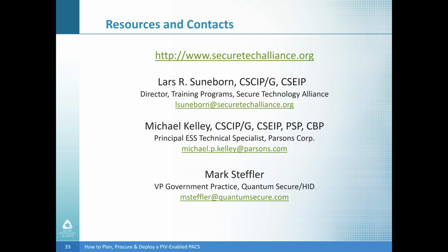Do you have to do an entire system? How many infrastructure changes do you make? So without having that current state, desired end state, and the gap analysis done, you really won't know for sure how to estimate or budget for it. So I would start with those if you haven't been given a budget target, and then look at the size of your project and the equipment you're going to have to replace.